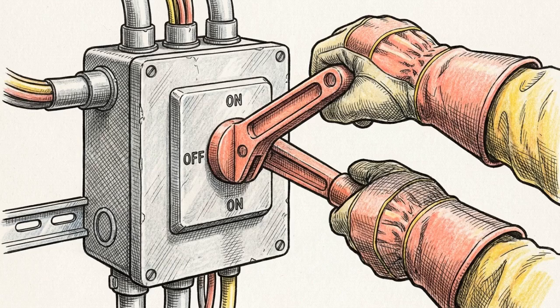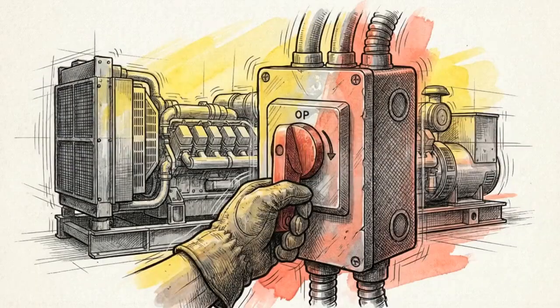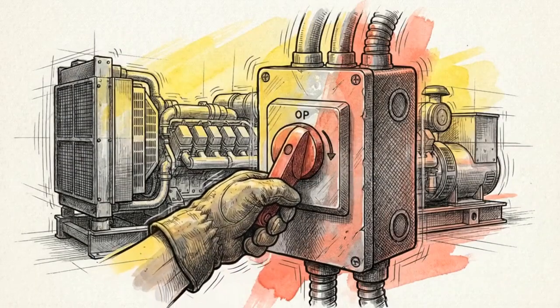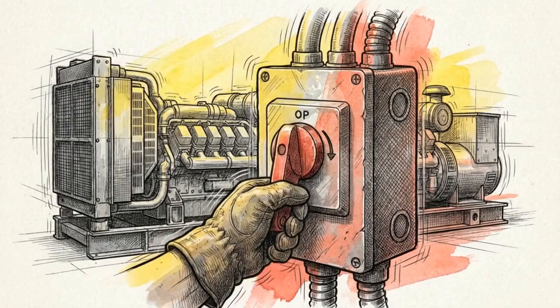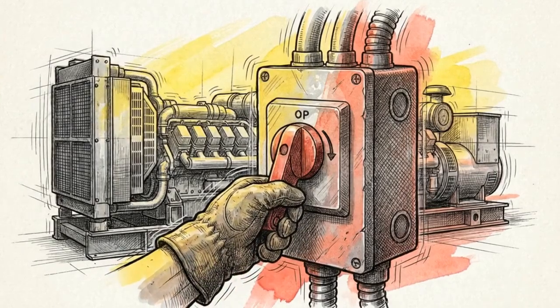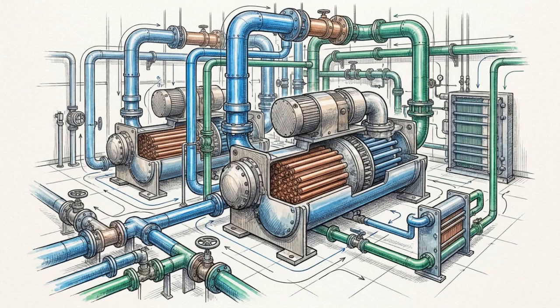Known informally as pulling the plug, this stage violently tests the boundaries between normal utility power, emergency generator power, and the active cooling redundancies designed to bridge the gap. A facility's reliability is not defined by its design specifications. It is only considered operational after its physical components survive this sequential risk-closing gauntlet.